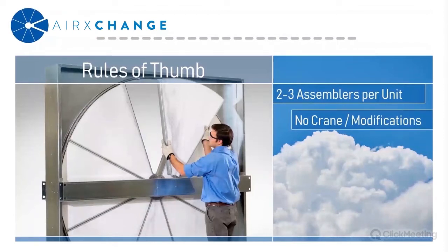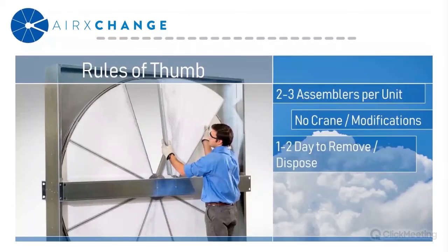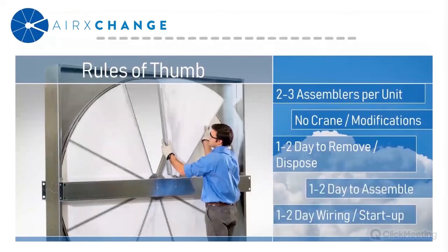The majority of the heavy lifting is really in the removal of the existing component. So for the majority of the projects we're involved in, it usually takes, once again, 1 to 2 days to disassemble and dispose of the existing wheel component. The new wheel components, once again, typically takes 1 to 2 days to assemble. And lastly, for the startup, once again, 1 to 2 days. And basically, after you're done buttoning up the job, we would offer our standard warranty on the complete design.